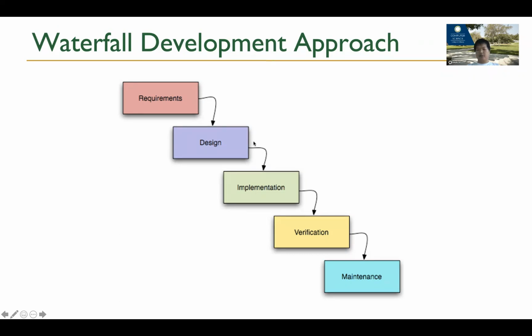Maybe draw some UML diagrams. Maybe you need to write a lot of documentation. You need to draw all the different architecture diagrams for a system. And the design probably also can take 1 or 2 months. All right, so that's about 3 months.